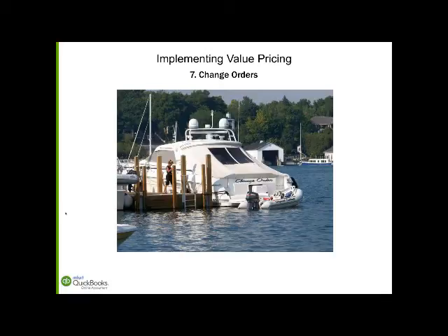Now, sometimes a change request does not lead to a price change. It may lead to a duration change. It may lead to, you're not going to get this by February 15th. It's not going to be the end of the month, right? Or it could change the quality. It doesn't always necessarily mean a price change, although I think in the majority of cases it does, but sometimes it doesn't. It could just mean you're changing the deadline on this. But a change request is triggered first, and then it's approved by the economic buyer on the customer side to go into a formal change order.